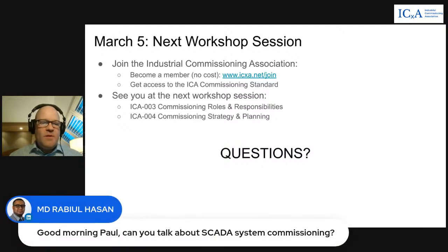SCADA system commissioning. Yep, so definitely that's one important aspect of the 3 principal disciplines: mechanical systems, electrical systems, and automation systems. All 3 of these need to function together for a fully functioning system, right? Too often we see the controls or the SCADA systems trying to integrate all of those aspects at the end of the project, and that never goes well. Everybody always overestimates the efforts to get the control systems working on projects.